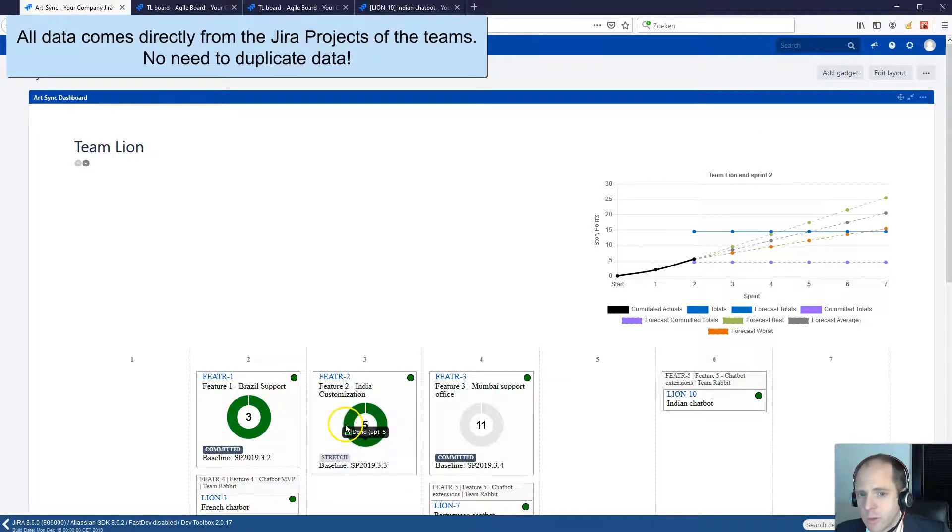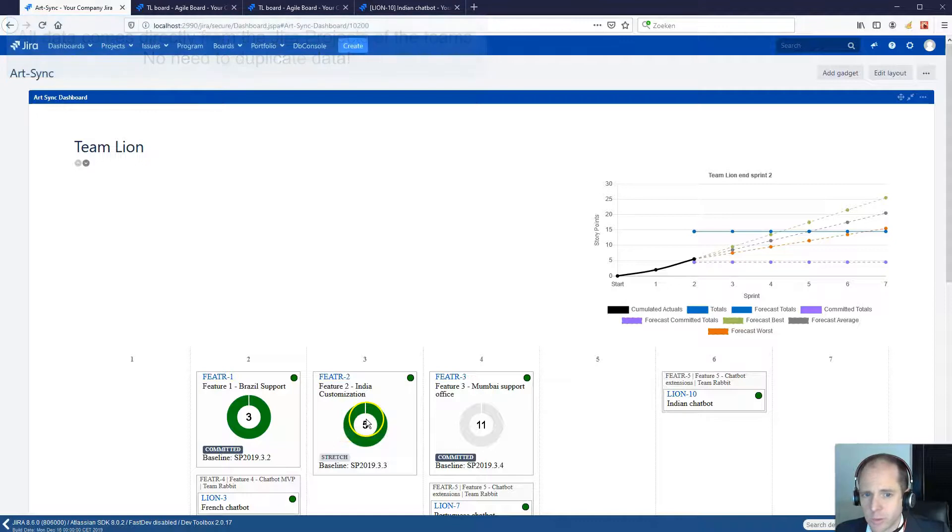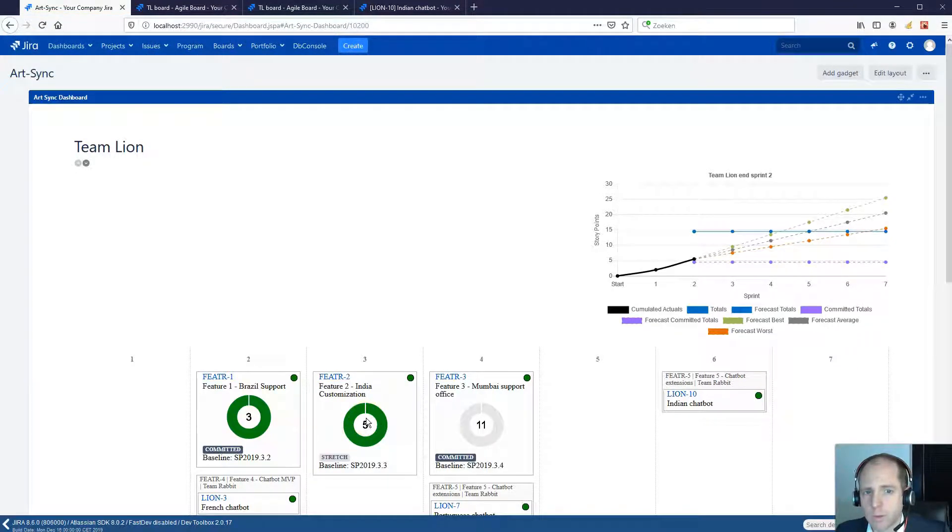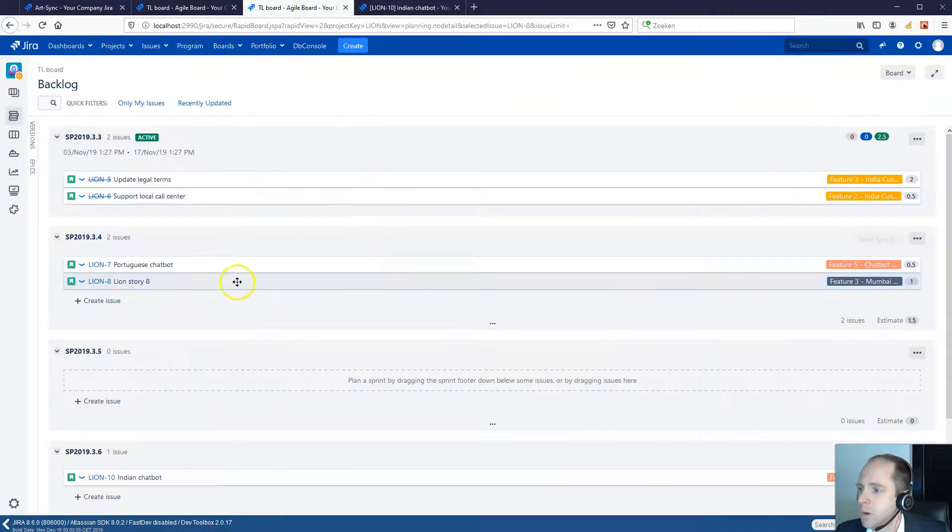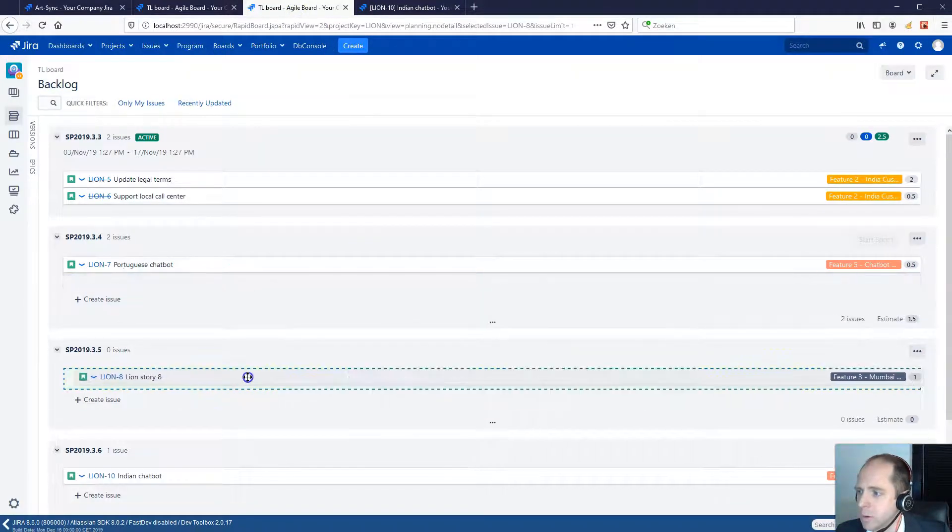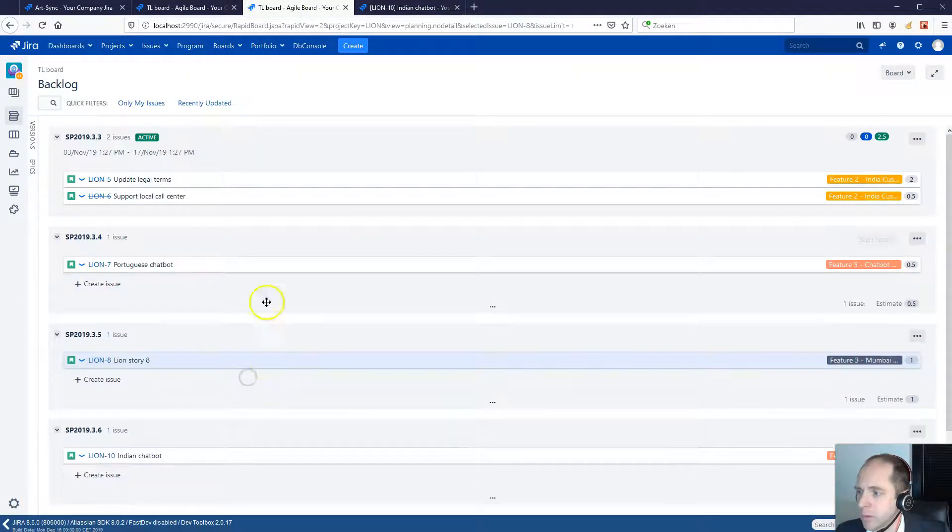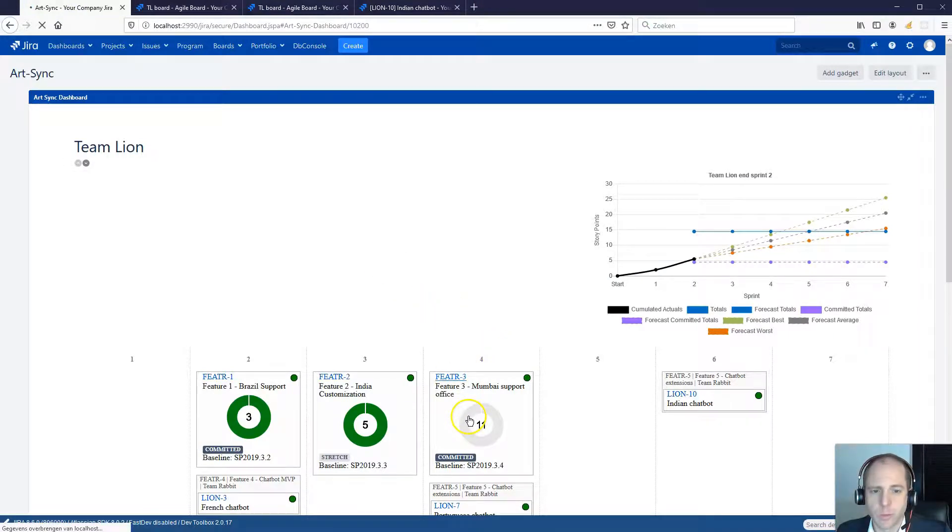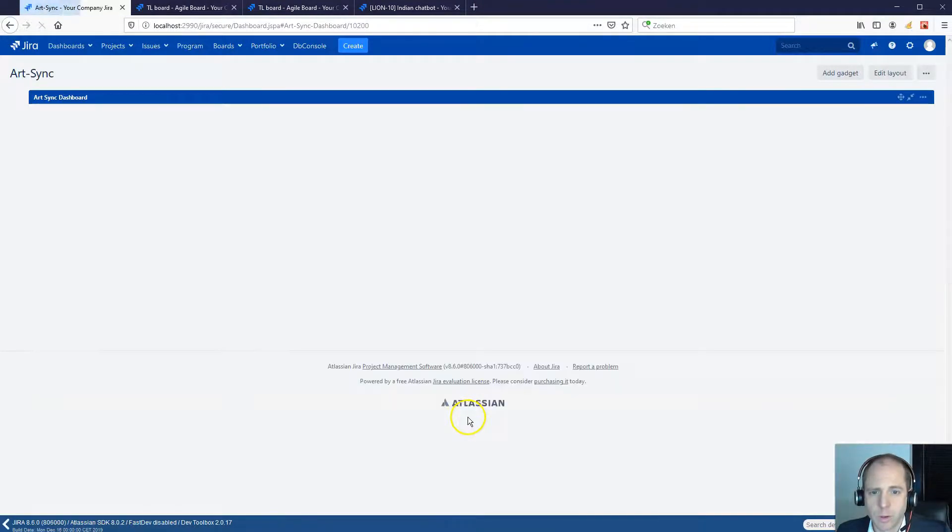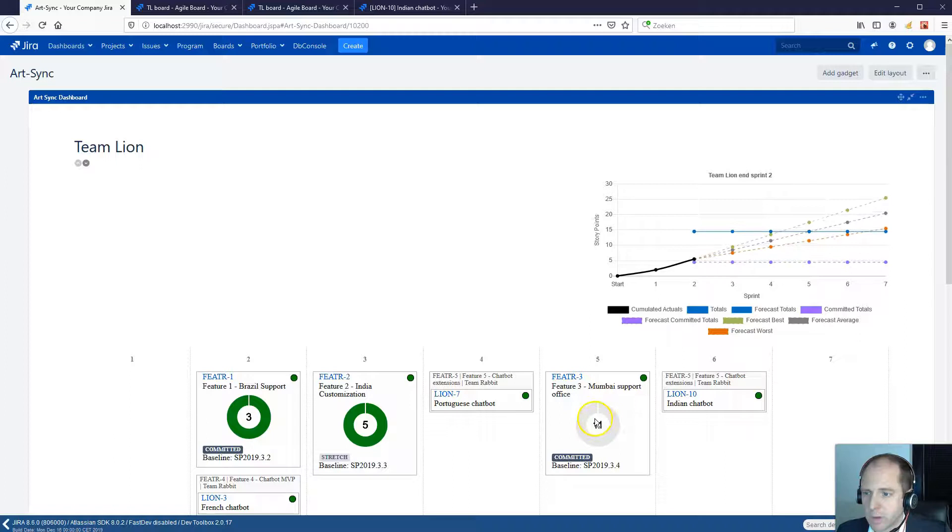The feature itself moves together with the underlying stories. Suppose that a team does not finish its stories in time and for example shifts a story from sprint 4 to sprint 5. In that case, the feature also moves from sprint 4 to sprint 5.